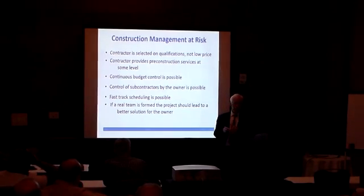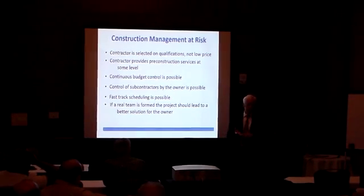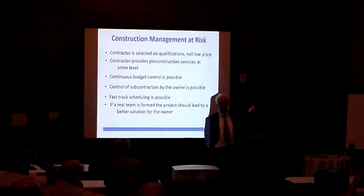By day 10, the structural engineer had already decided that he was going to use bar joists to frame his roof. Well, to get bar joists nowadays, delivery time is well over 12 weeks, and then shop drawing time for these folks is 2 weeks. And the point of it is, that just wasn't going to work. And we could go to cold form steel and have that the next day.